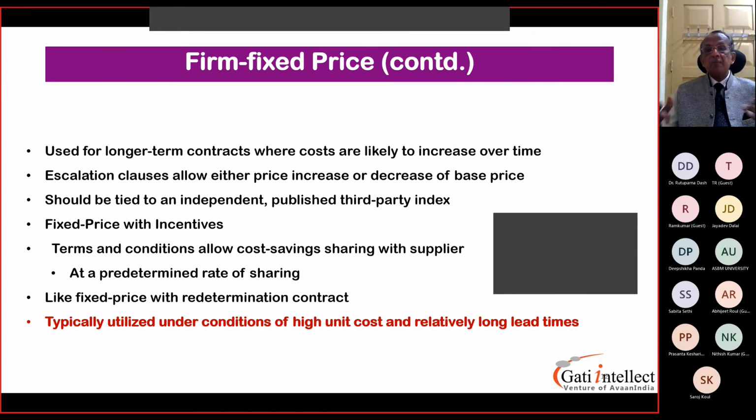So again, whatever is agreed on, yes. The cost can change according to the market situation. Nobody has got any control over it. So there is an agreement between both the parties. In case of an agreement, in case of an increase in the price, this has to be notified and then ratified and then only put into practice. So there is an understanding between the two.